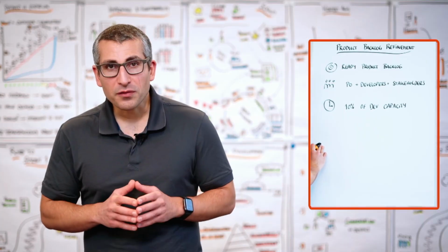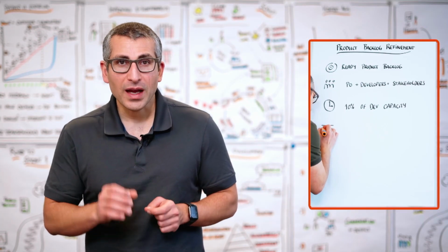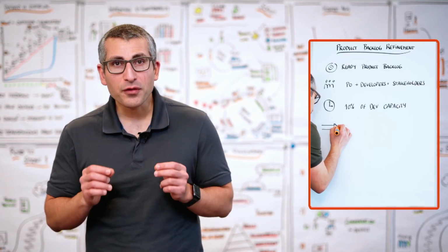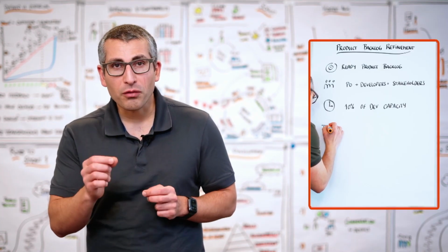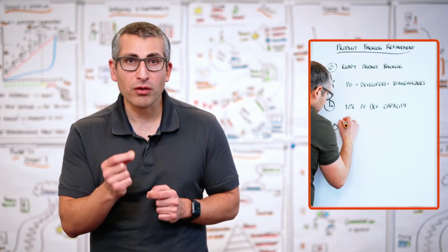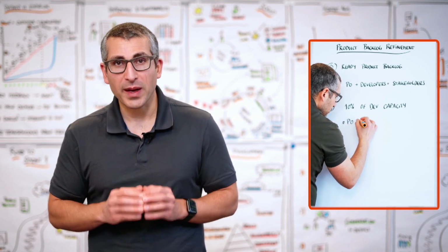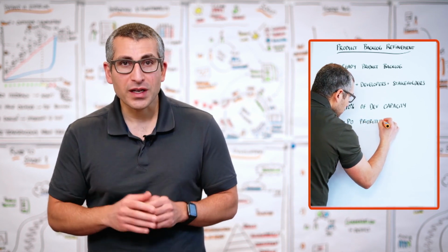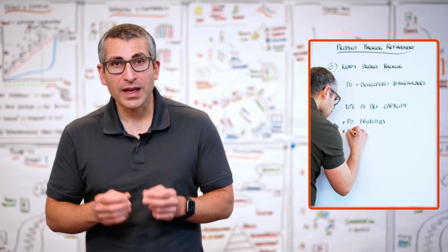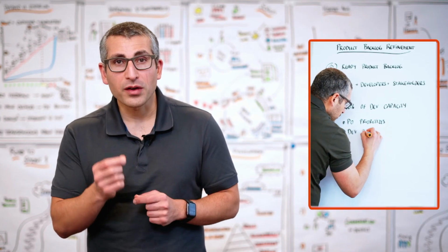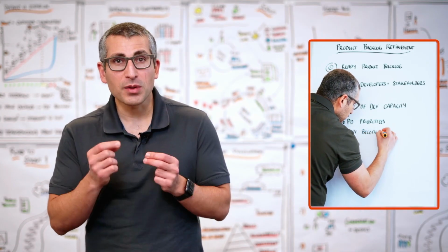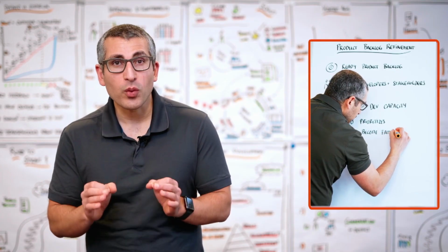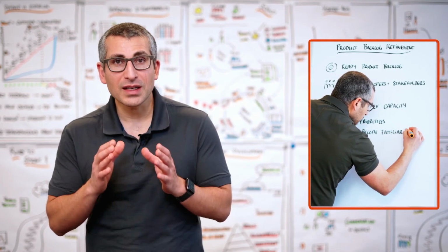As preparation for the product backlog refinement, I highly recommend every product owner to go through that product backlog and prioritize it from a customer perspective. Also, I would recommend to developers to take a look at that product backlog and get a sense of whether there are technical dependencies between those items, so that they are well prepared for the activity itself.